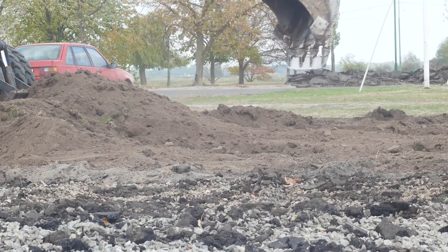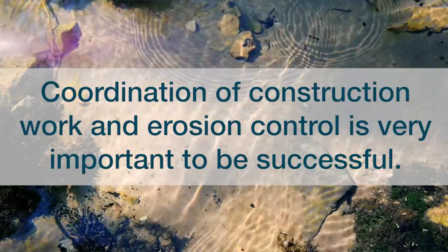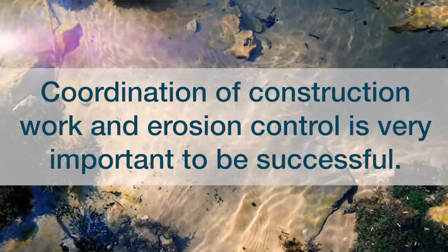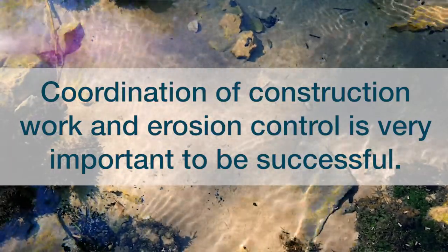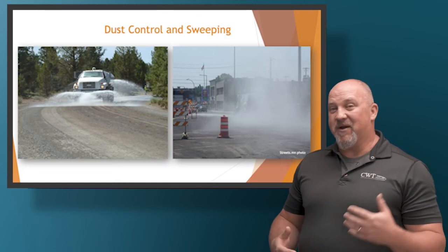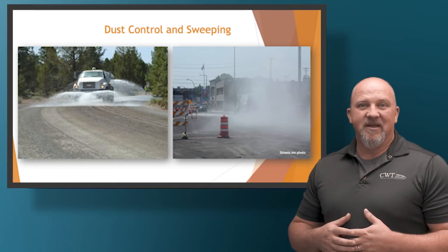And you just sprayed the whole thing and we've actually got to use it tomorrow. So you have to think about what BMPs go in and when for your site to become effective moving forward through the start of construction to the finish of the project. Dust control and sweeping are activities that you're going to have to consider.